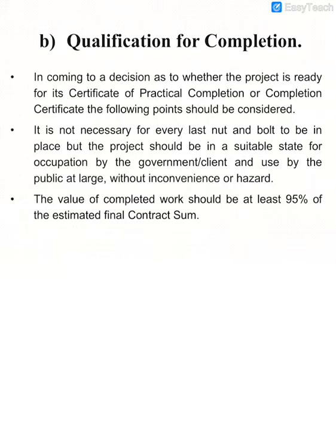qualification for completion. In coming to the decision as to whether the project is ready for the certificate of practical completion, it is not necessary that every nut and bolt be placed, but the project should be in a suitable state for occupation by government or client, and for use by the public at large without inconvenience or hazard.